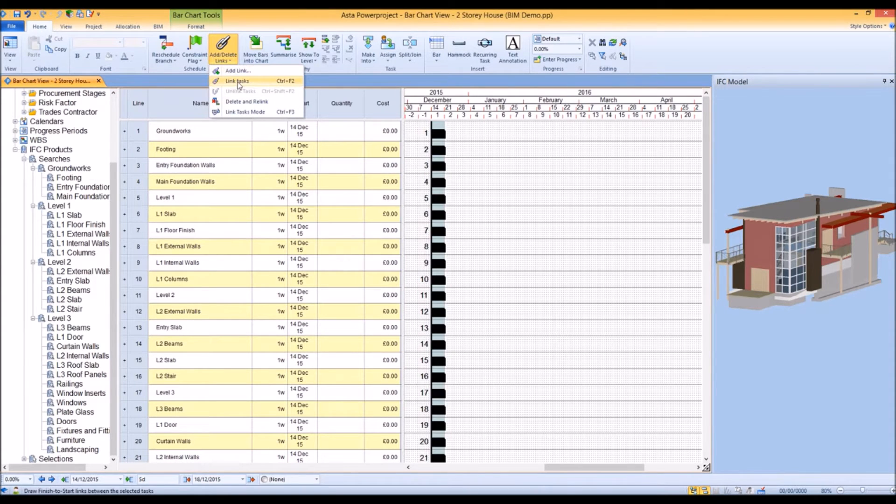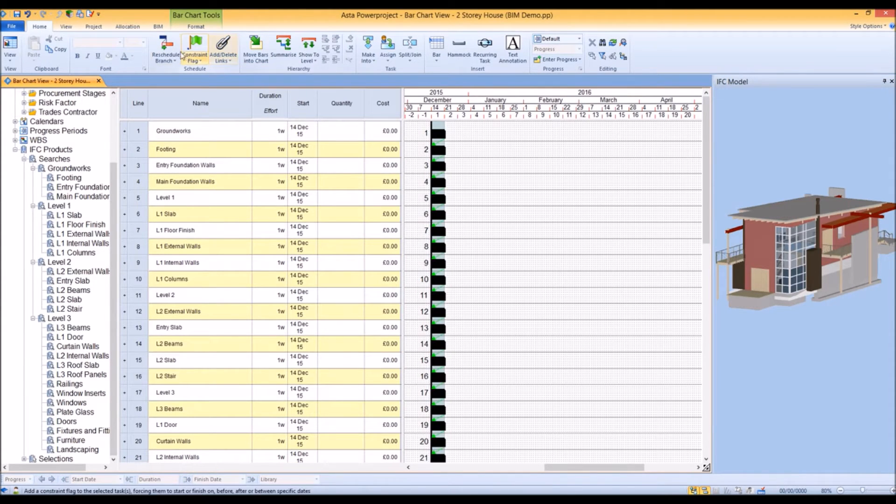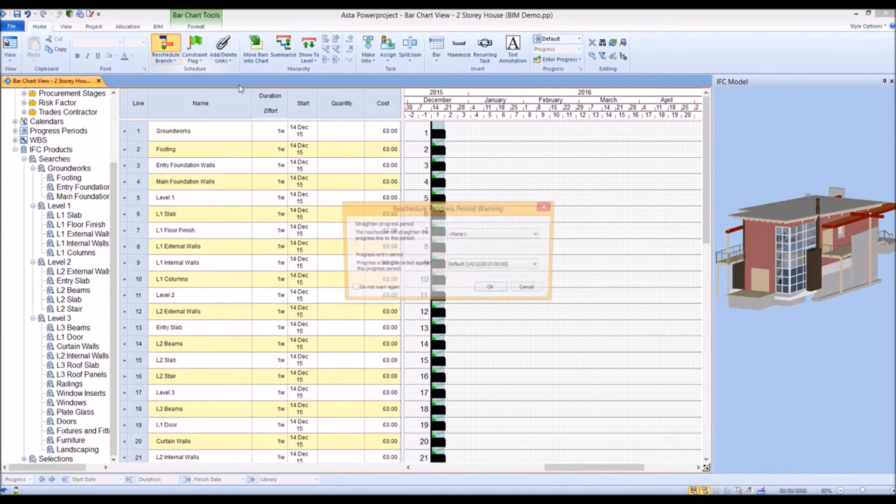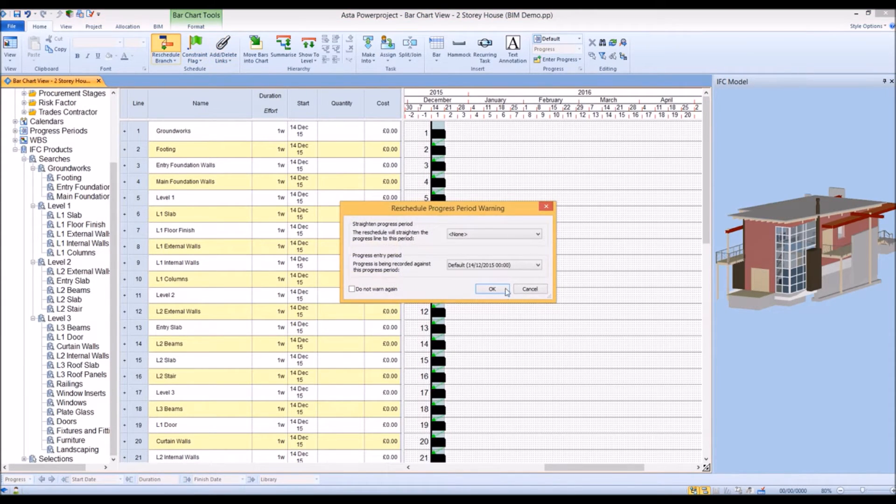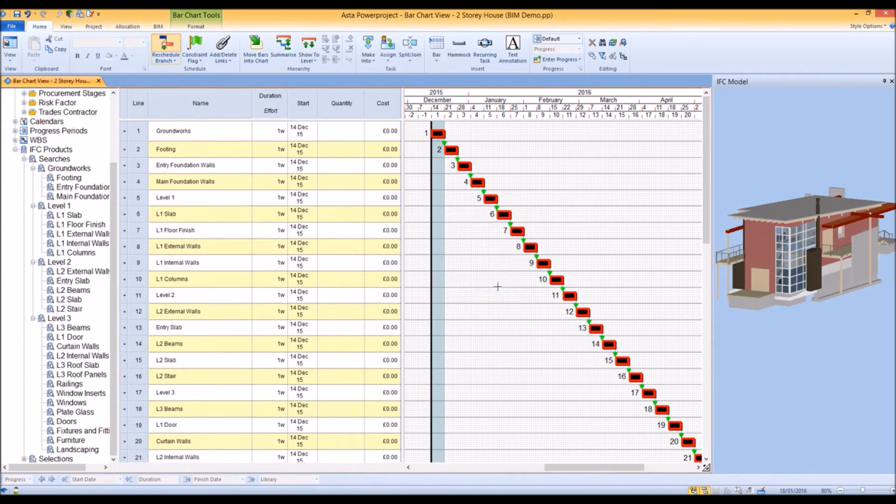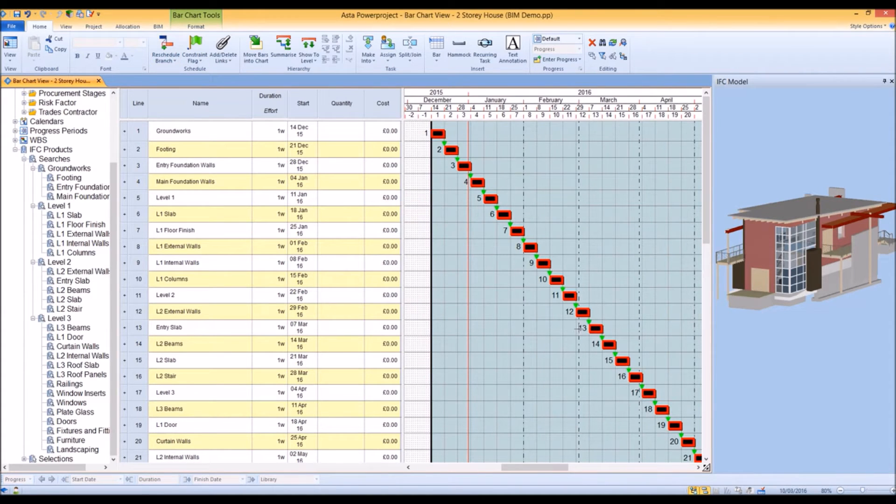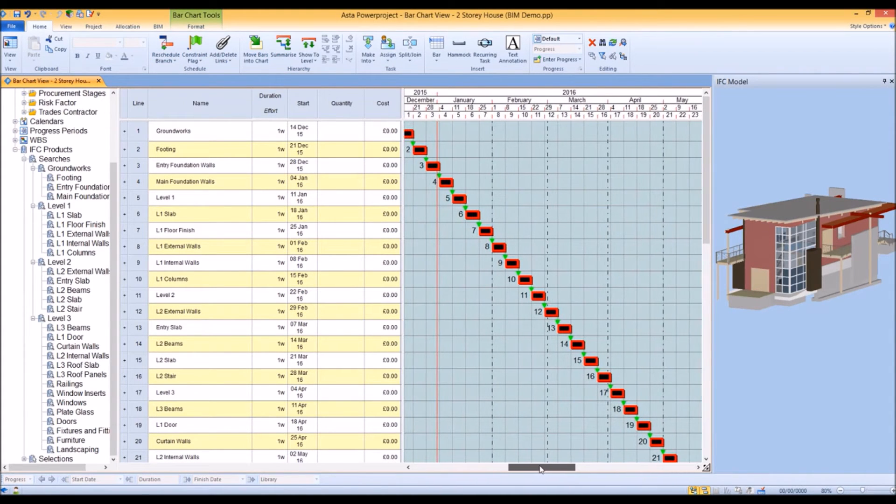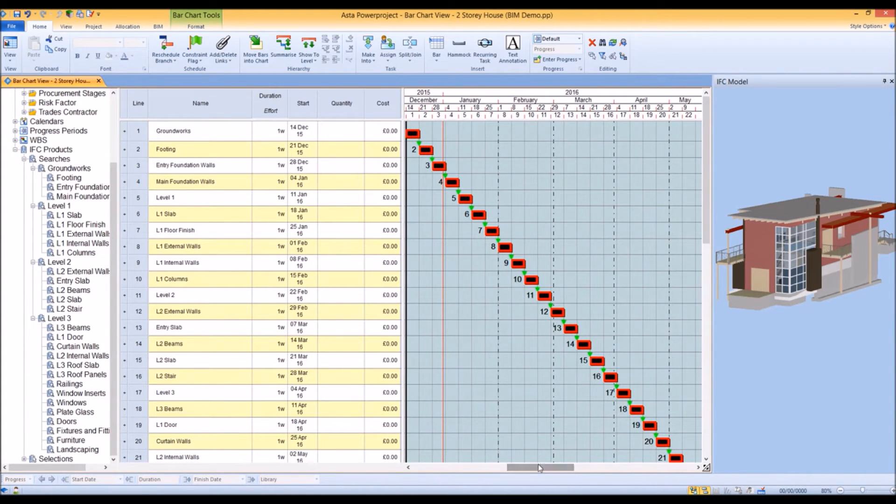Before we do that, let's link the tasks using the standard finish-to-start links and reschedule our program.